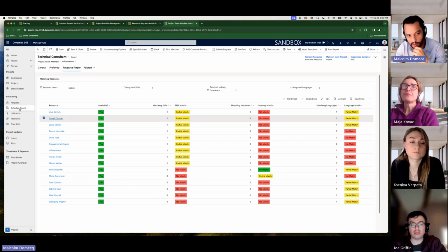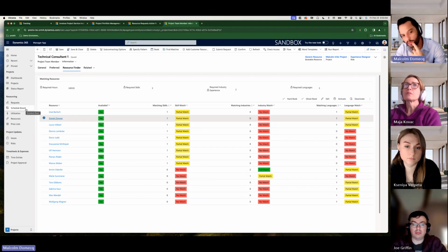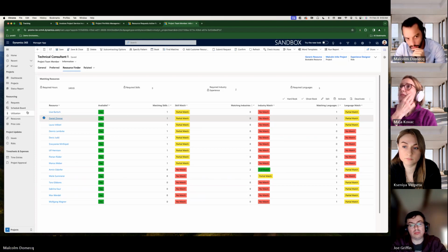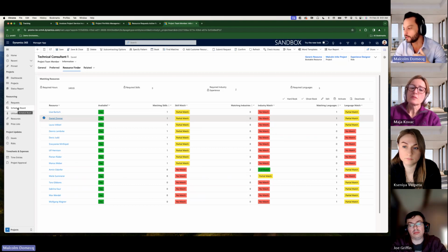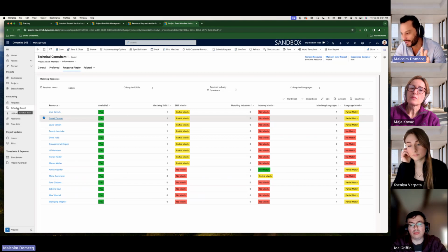Now, what you will see, in these particular environments, we did a test for more than 20 to 60,000 resources. That is the requirement that we got from some of our customers, right? The issue they have with the schedule board is that it can take up to 10 minutes, which is too long. So the usual way they go about it is to preset some filtering criteria so it takes less time. They keep it open, never close it. That's the recommendation, right?